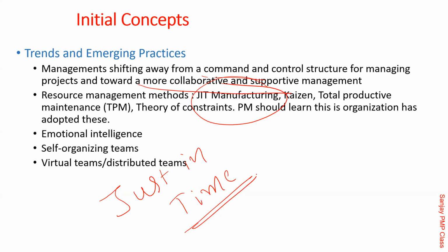Another thing is that your requirement clarity, your exact timeline clarity and all that will come when you are closer to it. If you keep recruiting people ahead of time, predicting by looking at the projection, you might end up getting people who don't have the right skills. So for example, 4 months down the line, I need some Java resources. If that's my prediction, and I recruit them ahead of time, that is a good advantage, because at the last minute there is no rush; you have done the recruitment.